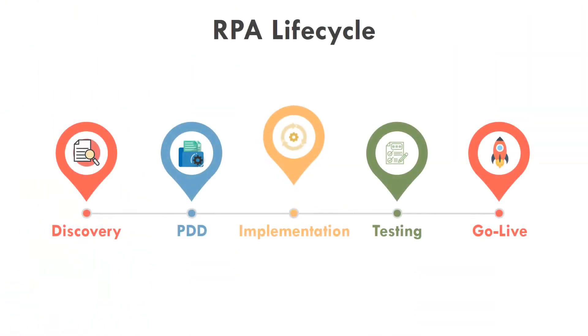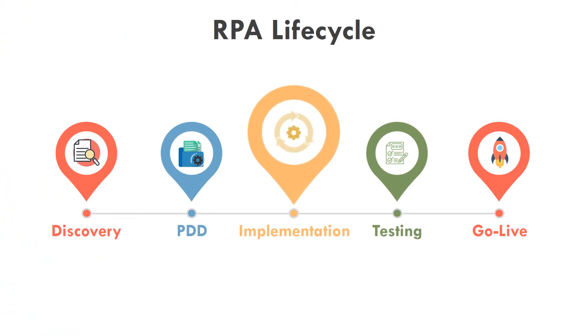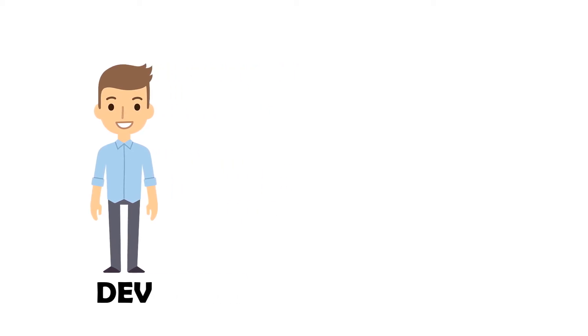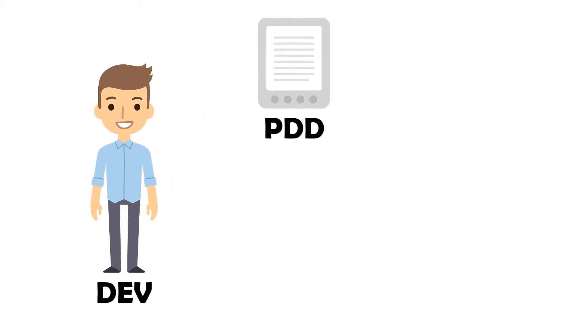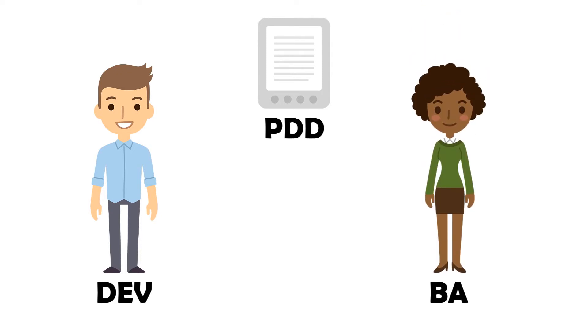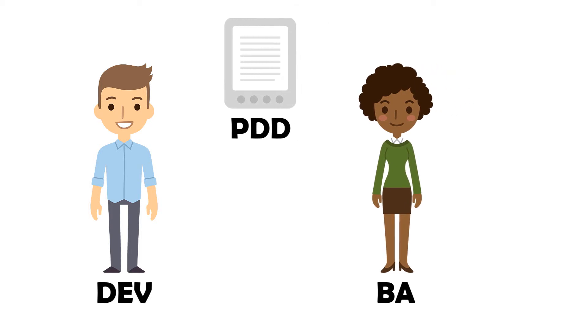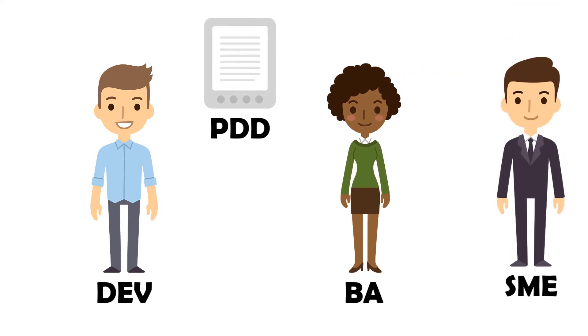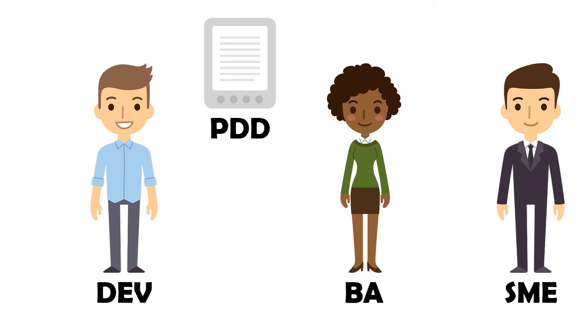After the PDD has been created, we can move on to the next phase, implementation. The main person in this phase is the developer. He implements the bot in an automation tool using the PDD. If there are any questions or ambiguities in the PDD, the developer contacts the business analyst. If the business analyst cannot answer the questions, she or he contacts the department and clarifies the open questions.